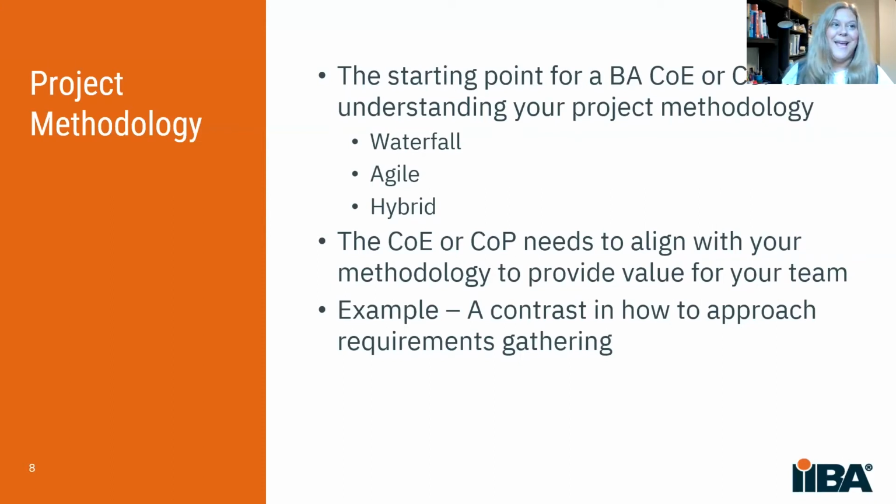And the BA skills and the templates and the standards in that scenario need to support an iterative and incremental approach. And the documentation, in contrast, is actually quite light. Before we even bring anything into the sprint, we'll often do a discovery. And the focus is specifically on the epics that the PM has set out in the ready backlog, which is kind of like a flashlight of what is in scope for the next, say, 3 to 6 sprints. Things will be a bit more groomed.